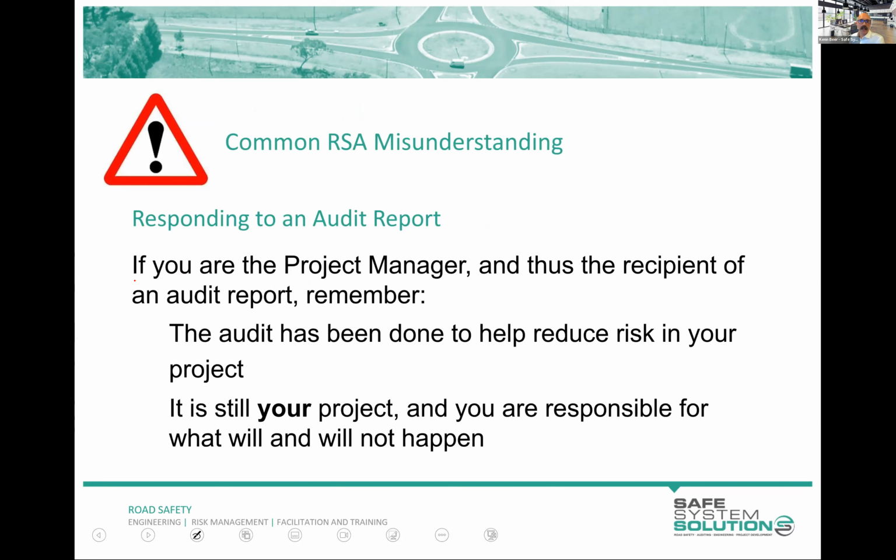A common misunderstanding is that people think the project manager must do everything the auditor says. That's not at all the case. The auditors have no legislative power. They are simply providing an advice piece. But that being said, if the project manager or the designer or whoever's receiving this audit report is not going to do something or they disagree with it, they really need to justify that in their response. It's okay to do it, but just justify it. It's their project, and they decide what happens.